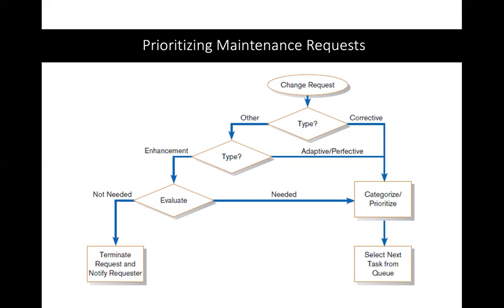It could well be the case that you may have a request going in as either corrective, adaptive, perfective, or an enhancement that is needed, and it's low priority. It ain't going to get through for a long time as long as there are higher priority requests coming through the system. Okay, so low priority tasks may never actually be got to. Okay, just remember as well, perfective, this is where technical changes are put in place to increase the performance. So if that's necessary, then that's what's needed.